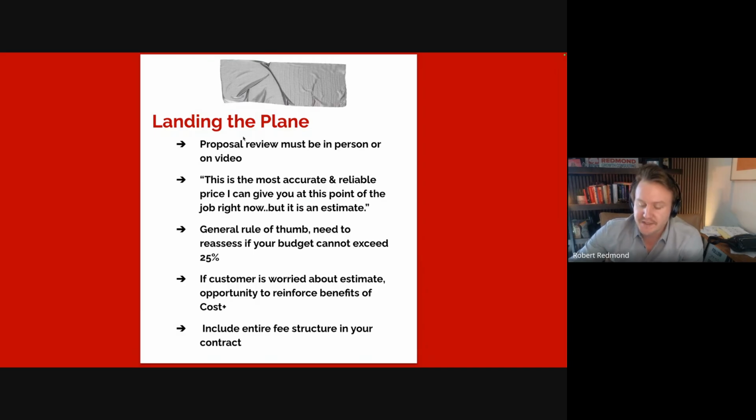The main reason we're advocating for cost plus is the nature of most construction projects. After we start, there's stuff that we uncover that was just impossible to see beforehand. There are scope changes that the customer wants to make, and those often affect a lot of other parts of the job. So there are more variables that change the job, which is why you have to have a building model that is more fluid and can flow with those variables.